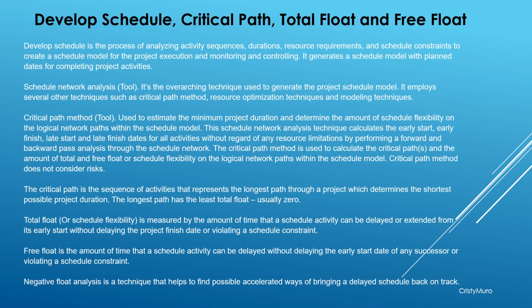Develop schedule, critical path, total float, and free float. Develop schedule. Develop schedule is a process of analyzing activity sequences, durations, resource requirements, and schedule constraints to create a schedule model for the project execution and monitoring and controlling. It generates a schedule model with planned days for completing project activities.